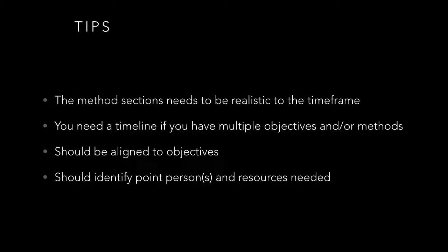So we could have just gone and tried to put it all within a year. But what would have happened is when we got close to the end of that year, we would have only had a third of the work probably done, and then we would have gotten into a little bit of trouble with the FAA because we'd have to tell them that we need more time. So it's better to be honest up front. So what we did in our methods section is we broke it into 3 phases over 3 years, and they were happy with that.